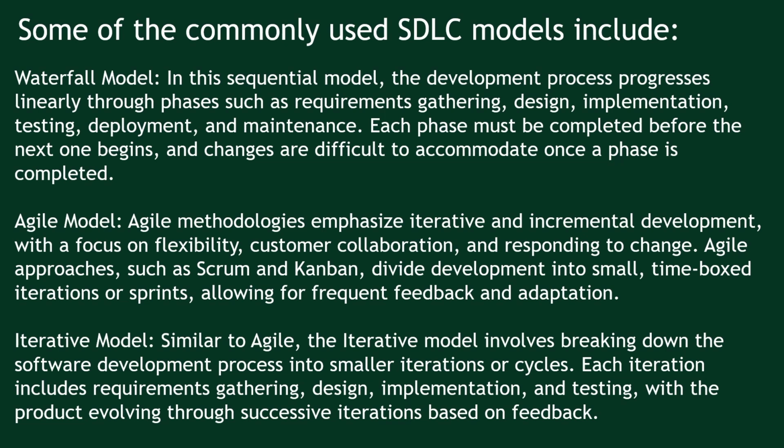Agile model. Agile methodologies emphasize iterative and incremental development with a focus on flexibility, customer collaboration, and responding to change. Agile approaches such as Scrum and Kanban divide development into small, time-boxed iterations or sprints, allowing for frequent feedback and adaptation.